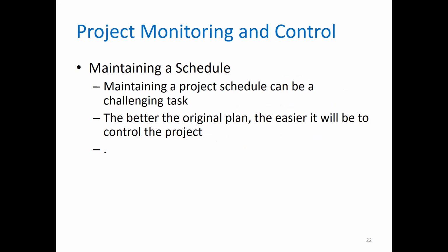Maintaining a schedule. Maintaining a project schedule can be a challenging task. The better the original plan, the easier it will be to control the project. Project managers often spend most of their time tracking the tasks along the critical path because delays in those tasks have the greatest potential to delay or jeopardize the project. This is where the importance of PERT charts is also realized in the project management phases.